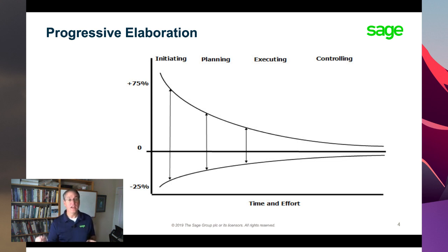One of the outcomes is in our cost-benefit analysis, which we don't have time for. We want to make sure that the benefit significantly outweighs the cost, just in case we get involved in a situation where the costs end up being double and maybe even triple what we think they're going to be. We want to make sure that the benefits far outweigh those, to the point where maybe they're 3, 4, 5, even 10 times higher than the perceived cost.